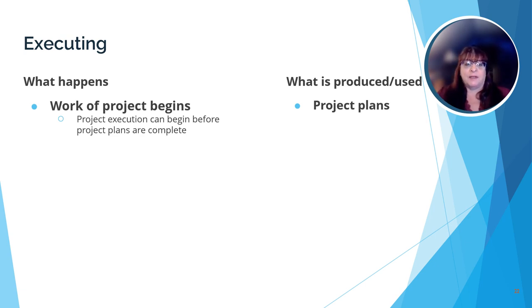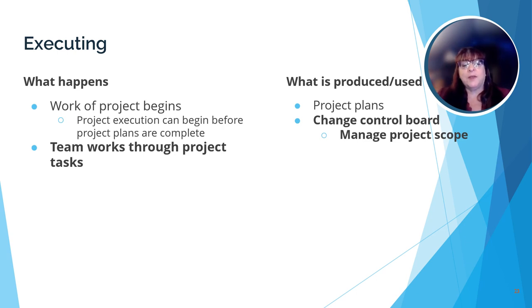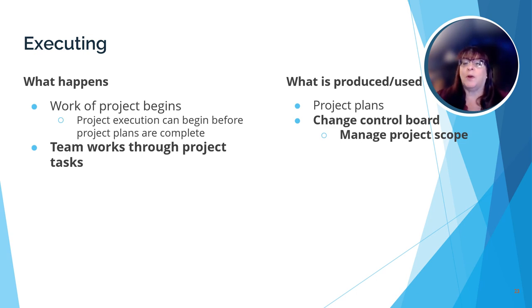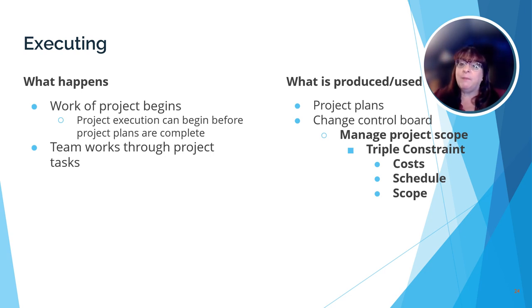Here we are in the execution phase of the project — where the project tasks actually begin. Just remember, the work of a project may begin before the project plans have been completed; at this point, they may still be a work in progress. The execution phase is pretty self-explanatory: the project tasks are implemented according to the project plans. As we've discussed when reviewing the triple constraint theory, it's up to the project manager and their team to keep track of the scope, the budget, and the schedule of the project to make sure those areas don't deviate completely from the planning documents. The project manager may create a change control board where they can keep track of any requested changes to the project plan, noting how each change in scope will impact the budget or project schedule. If a change is going to make big changes to either of those, the project manager may need to go back to the project sponsor and request extra funds or more time.